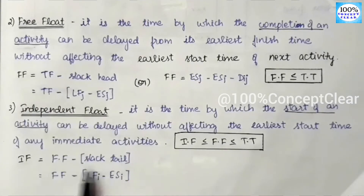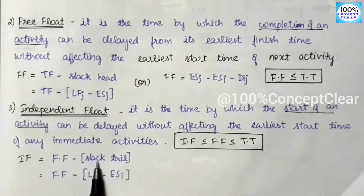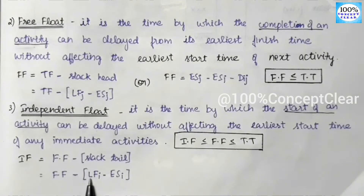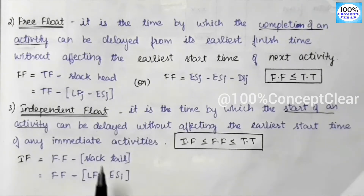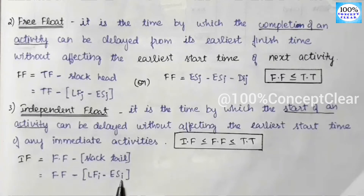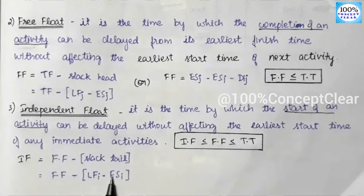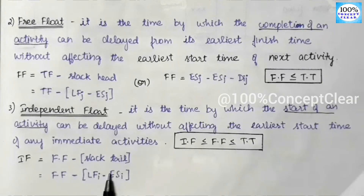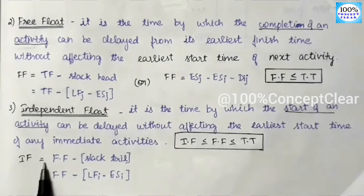Slack Tail refers to the starting event, denoted as i. Slack Tail = Late Finish of starting activity minus Early Start of starting activity. So Independent Float = Free Float minus Slack Tail.